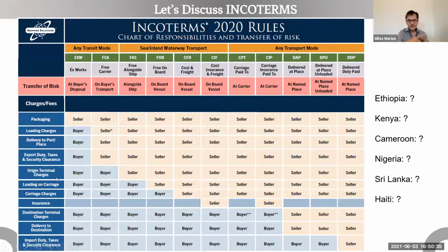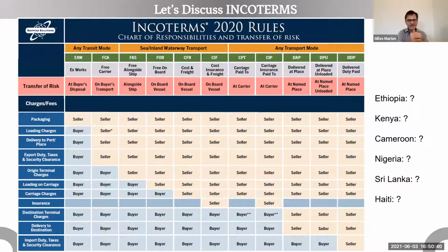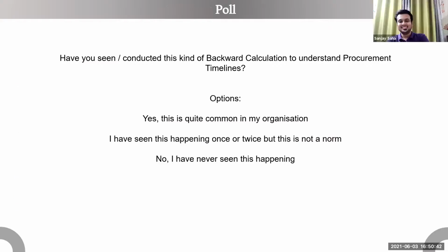Yeah, just to add on this. It's not that I don't want to go to Incoterms, but just one last thing before we go to Incoterms: as a supplier, what you like is a disorganized client. Exactly. You can negotiate a price for an agreement, but then when there is an emergency on your side as a client, because a clinic needs an urgent delivery, you go back to your supplier and say, by the way, we have this agreement, we said you would deliver on that day, but could you do a partial shipment to that clinic?